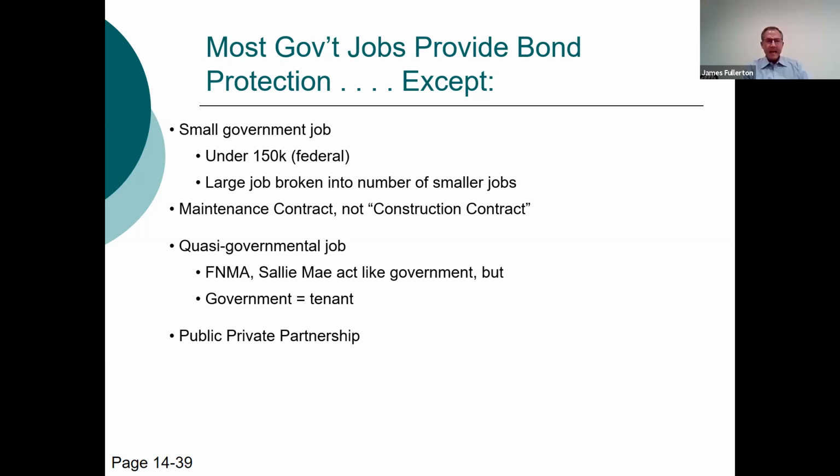We went to try to get a copy of the payment bond. There was none. That was a private project. It was being built on government real estate, so you had no mechanics lien rights. We could not lien the HOV lanes, but there was no payment bond. The government was not building the lanes. A private partnership, Floor Lane Company, was building the lanes, and they did not require payment bonds.